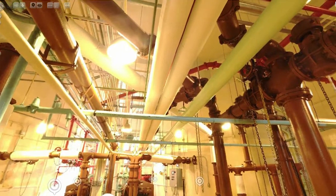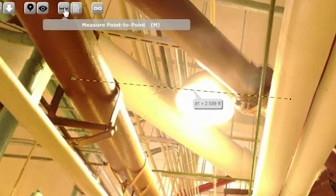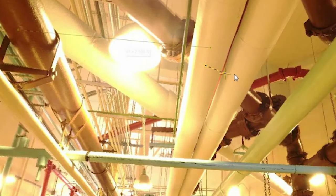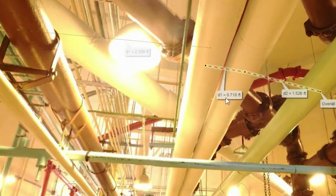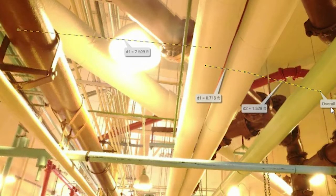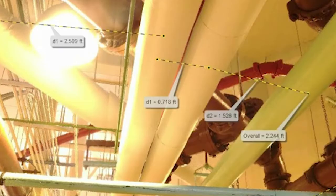This image provides a comprehensive virtual as-built of piping, ductwork, conduit, doorways, etc. As-built records locations only minimally. Human error can be introduced into as-built all too easily. The laser scanner measures everything that is exposed to the laser to demanding precision, safely without ladders or scaffold, to get those as-built dimensions that can't be matched using a tape measure.